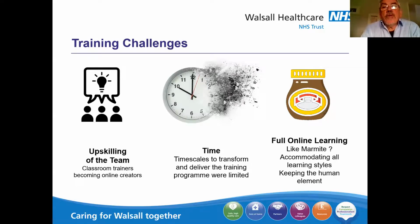The timescales, as indicated there, were very, very tight. We would normally want to have done that over several months. We effectively had weeks to do that. And our classroom training program was shortened from 8 weeks to 4 to accommodate that.